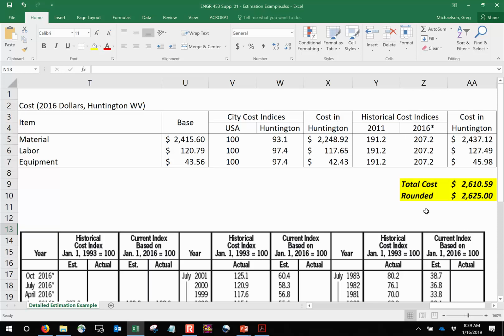Let me give you an example of that. These cost indices and cost data, they go down. If you look at the cost of, let's say, just a W14x74, the manual just says, here's how much it costs with labor, overhead, profit, and everything. And you could use that for your alternatives phase. But when you get to the final phase, then I want to see the super detailed one. But maybe that's not enough. Maybe you need to go further. And that's where your internal group has to make the decision. That's where I kind of have to bite my lip. I actually don't wish I could give you a yes or no answer, because I want you to get angry.